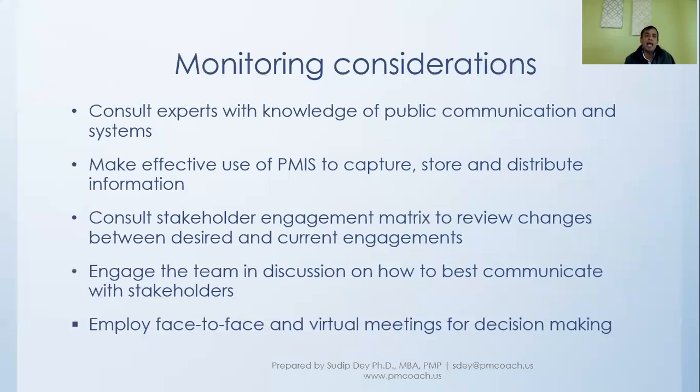And we'll employ face-to-face and virtual meetings for decision making, because when we have face-to-face or virtual meetings, that is when decision making becomes more powerful compared to email. Email especially doesn't work out very well when we have to make complex decisions.